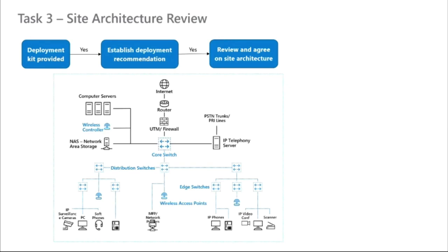Site architecture review. This is one of the key processes in a successful deployment. In the relationship with the customer, in the process from planning to deployment, at this stage we interact with the customer and ask him to share with us his plant, his site architecture, in order for us to understand what are the challenges that we might face.